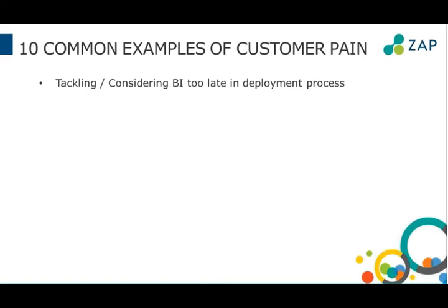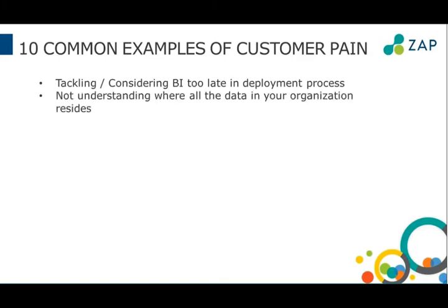So all I'm saying is, I'm not saying you necessarily have to deploy a BI solution throughout the process of ERP or CRM deployment, but you should consider it, and you should actually think about, through your sprint developments, making sure that BI is thought of, so that maybe at particular stages you run up an environment to make sure that what you're going to get out of your ERP and external data source solution will give you the information to run your business. That's a pain for everybody.